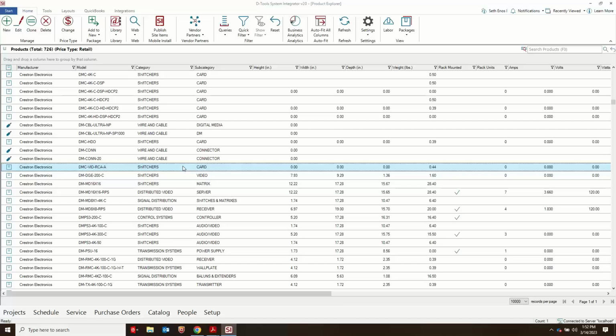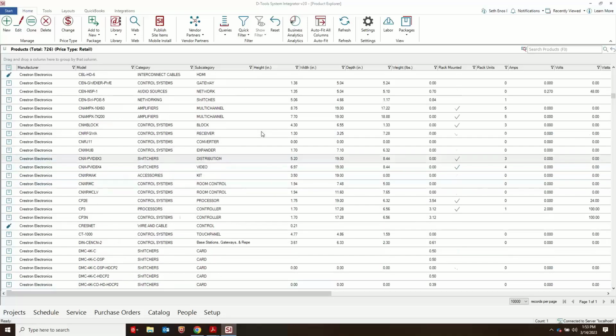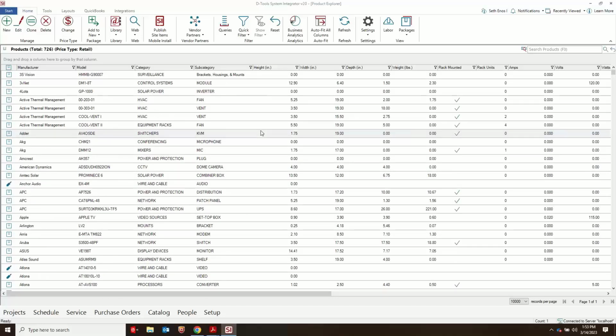You may not want in-house rack build or programming added to the task, because that was done not on site, but elsewhere, or it's going to be done elsewhere. So I don't want that added to the task. Those are some things to consider. I'm sure there will be a lot of questions around that, but other than showing you adding some tools in here, how to add multiple labor types, and the tools we built in here, that covers the basic concepts and the considerations of switching to this method.